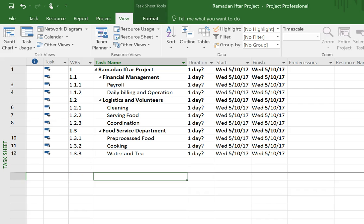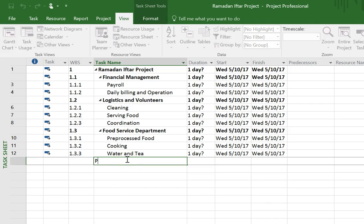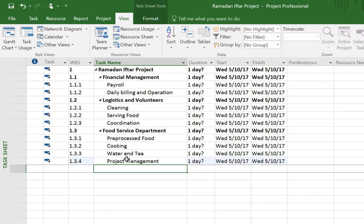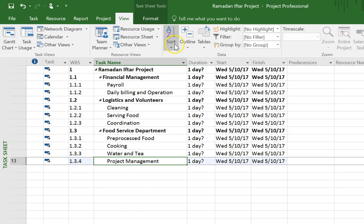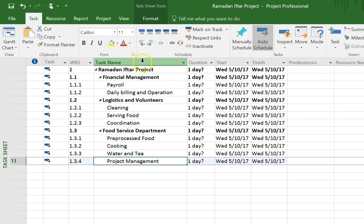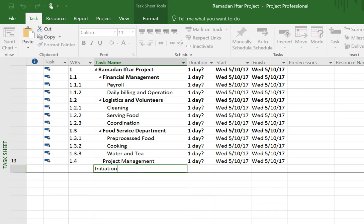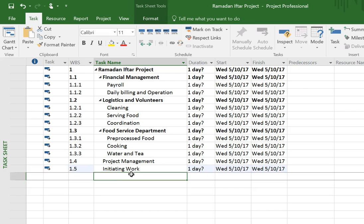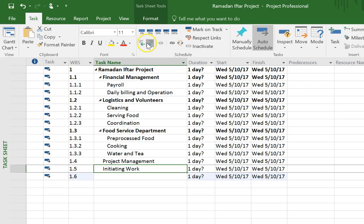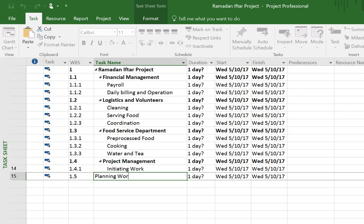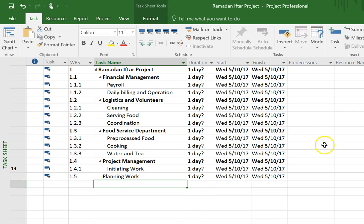One thing I notice is missing here is project management. It's possible project management belongs somewhere under logistics or coordination, but I really don't want the project manager hidden under Logistics and Volunteers, so I'm going to add that as its own category. Microsoft Project puts new tasks at the same level as the task right above, so I have to outdent that task to get it to the right level. Now it's 1.4, and I could put things like initiating work as one of the deliverables and planning work as another, indenting those as sub-tasks.